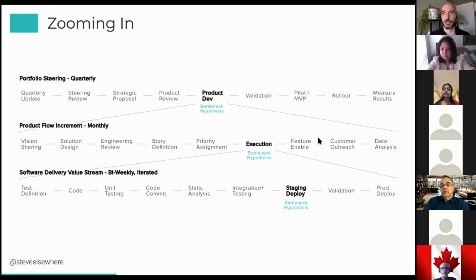And then we go into sort of a coaching model where every week or 2 weeks, we have a check-in to find out what the bottlenecks are, whether things are moving forward, whether there's things that I can help with. And that kind of loosens up a bit. So the total end-to-end time frame is usually about 3 months for a value stream to map the current state, synthesize all the data, plan a future state, and then iterate towards the future state. And then hopefully you've reached the future state at the end of that 3 months, and you can do another one. And you kind of iterate through every 3 months to keep moving ahead.